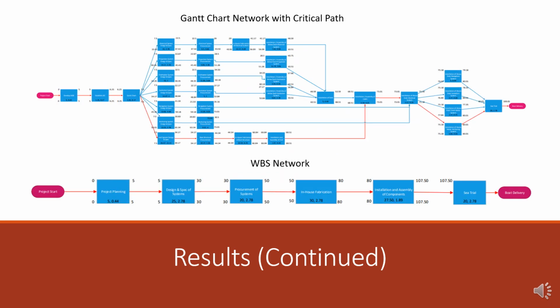Here's our final result, an overview of our network showing each critical step as well as the predecessors and successors to each task. Highlighted in red is the critical path that the project has to follow with its activities in order to stay on task to complete this project by the set day.